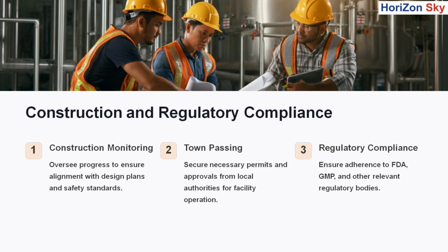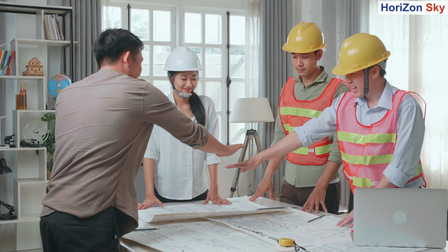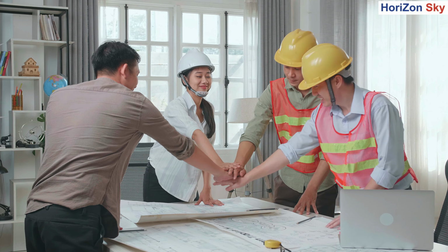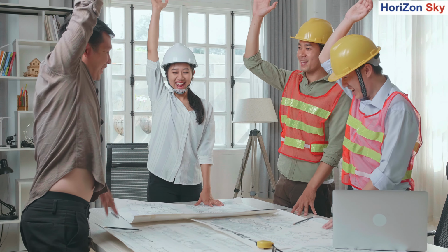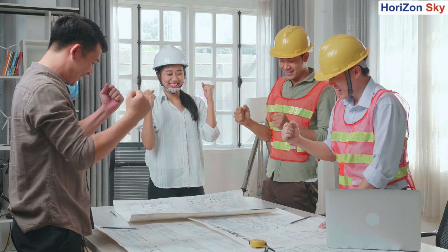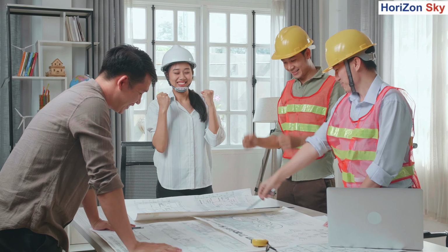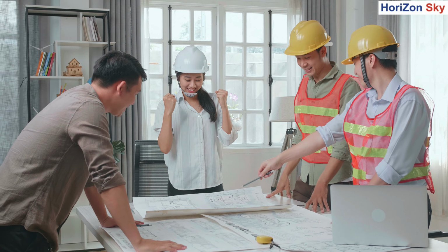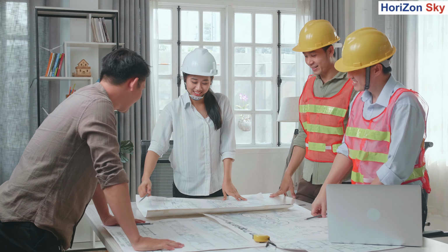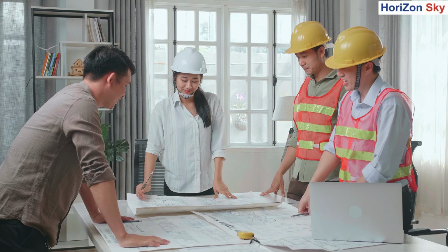Town passing a facility. Before the facility can begin operations, the corporate client team manages the town passing process. This involves securing all necessary permits and approvals from local authorities to ensure the facility complies with zoning, safety, and environmental regulations. Successful town passing is crucial for the legal operation of the facility.